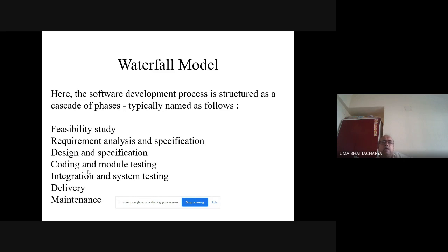Typically in a software project development work, not more than 20% of the entire job in terms of time should be devoted to coding. In fact, it is going down day by day. Remember, if you think this software development activity should take 1 month, 20% of that means 6 days. Not more than 6 days you should reserve for coding.